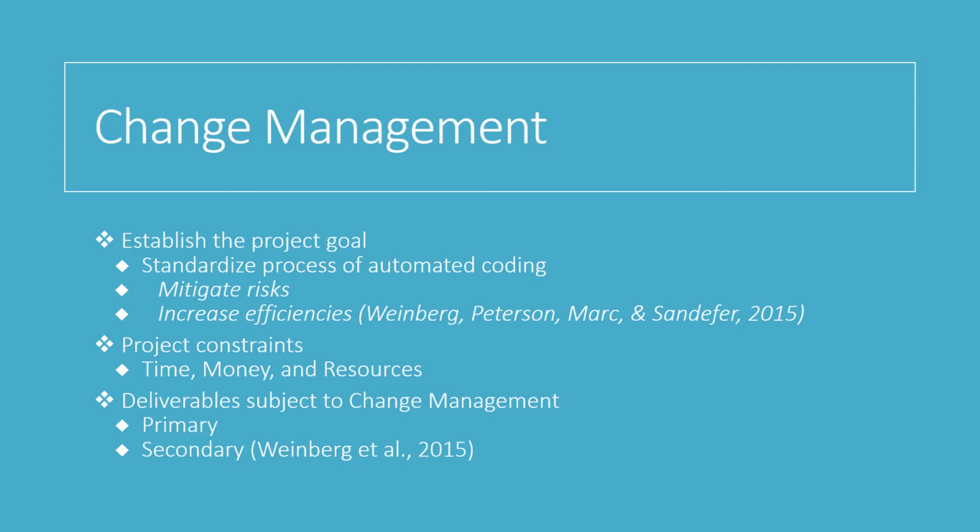We were also able to identify deliverables that would be subject to change management, including primary deliverables such as a new CAC tool, employee training, multiple secondary deliverables such as less time spent in manual coding, higher quality outputs, data reporting tools, etc., that will all be impacted by change management. So mapping out our current workflows for coding and a proposed workflow with a new computer automated coding tool helps identify all the elements that will need to be subject to change during this change management process.